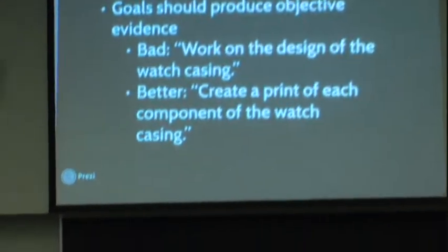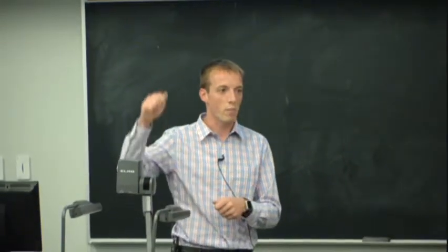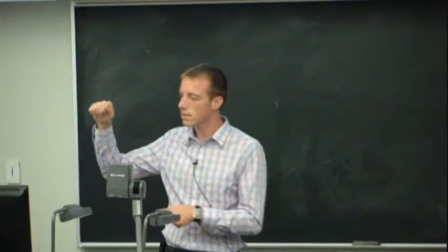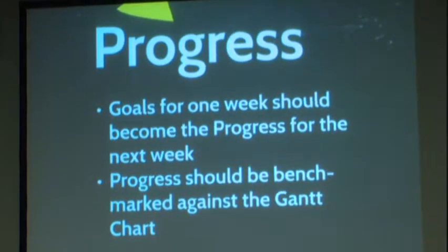What did you do? A much better goal is: I'm going to create a print for each component of the casing. Then you can come in and show me a set of prints and say, here are my prints, I did this work. It moved the project along. As a project manager, that lets you know that work has been done and it's been done correctly.